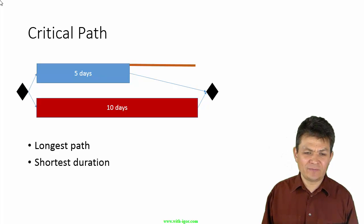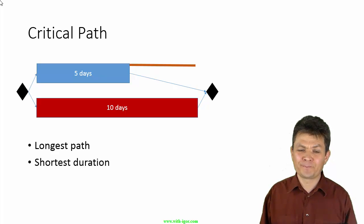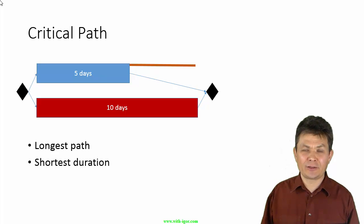Now, what it means, let's say, somebody who is working on the task that is blue task here, 5 days, says they are not going to be done on time. We realize that we have this extra time that they can spend without impacting the schedule.